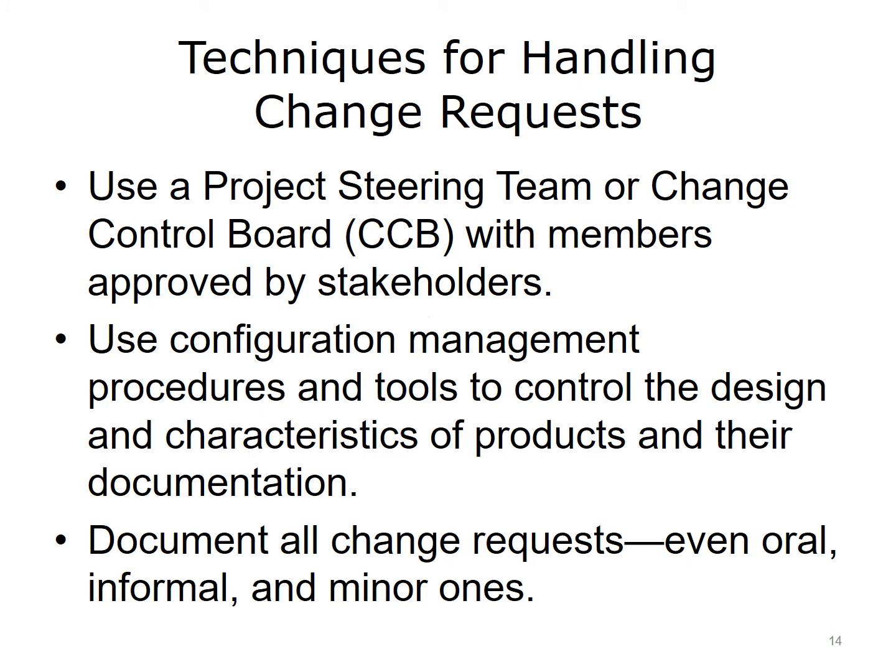Your process may include a project steering team or change control board to evaluate the changes with input from various stakeholders. Configuration management procedures and tools can help you keep track of versions of requirements, designs, code, tests, and so on. Carefully document all change requests, however minor they may seem. This system will help you remember details or suggestions presented in a casual conversation that may be useful later on.